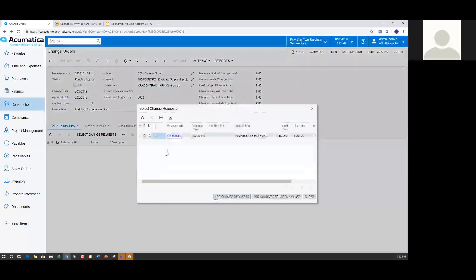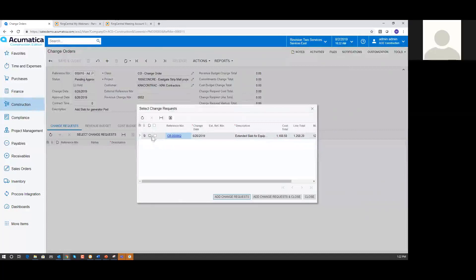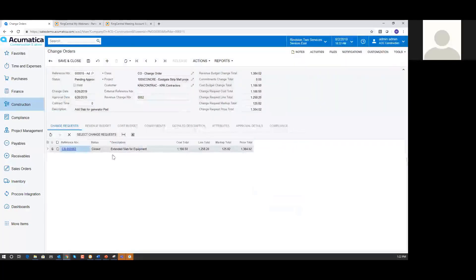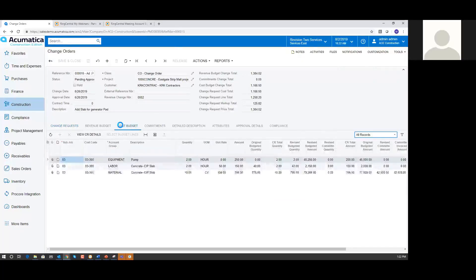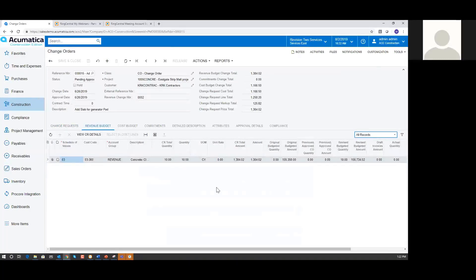I didn't save that, so let me go pull that right back in by adding change requests again. Now I've added that back in — I'll go ahead and hit Save. Now we're back, we've got our cost budget, we've got our revenue budget, and up at the top the header information has automatically filled out because we brought that data in from the change request. So now we see our budget total, cost budget total, change request total, and all the totals for this change order and how it was derived from that change request. That's what I wanted to share with you today — change requests and projects in the Acumatica Construction Edition.